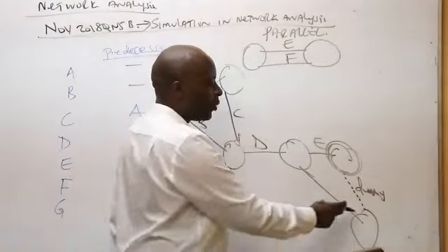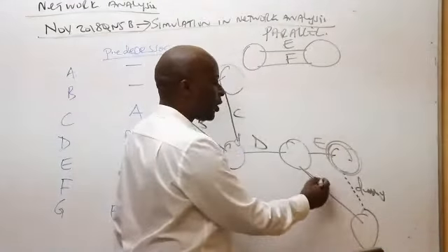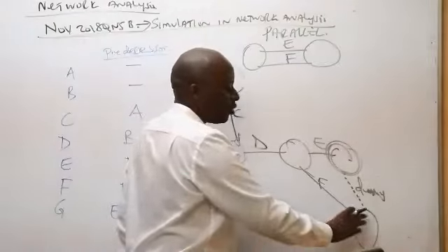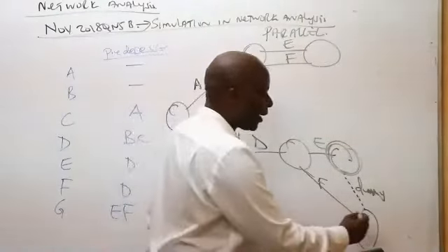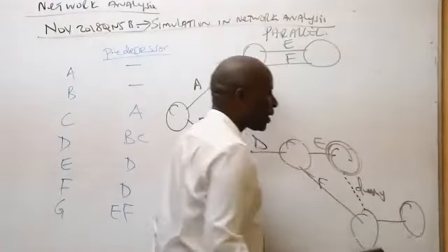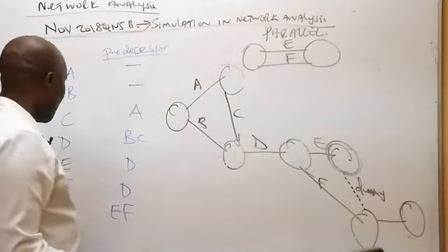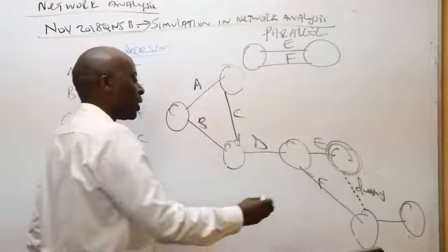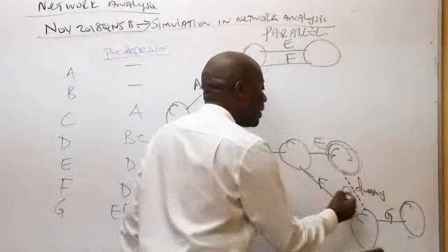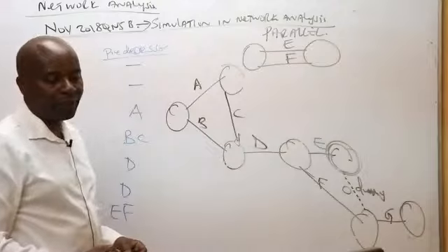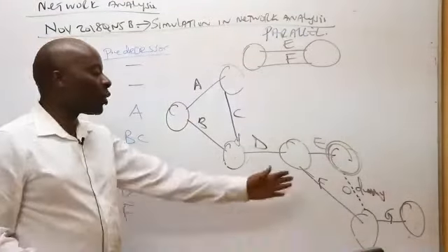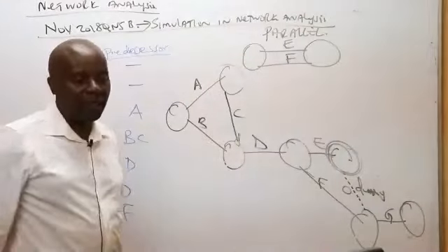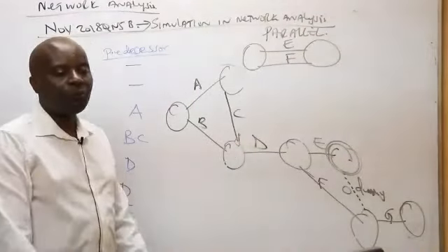So now, ladies and gentlemen, we have this node, which now signifies what here, somebody? The ending of both E and F. And once both have ended there, now I can come and pull my last activity known as G. Remember that a dummy is a non-existent activity, which does not consume any resources. So besides the dummy, I must always put what there, somebody? 0, like that. 0.